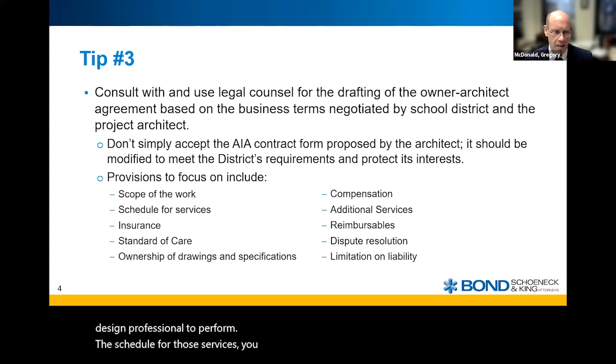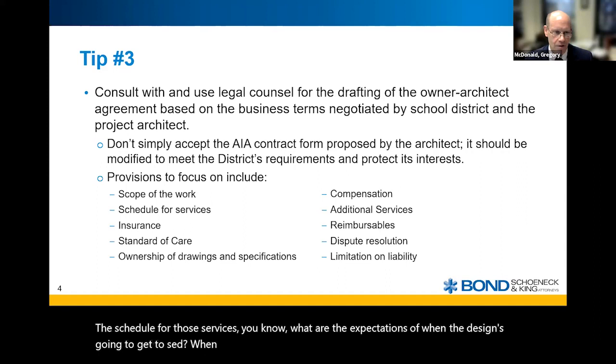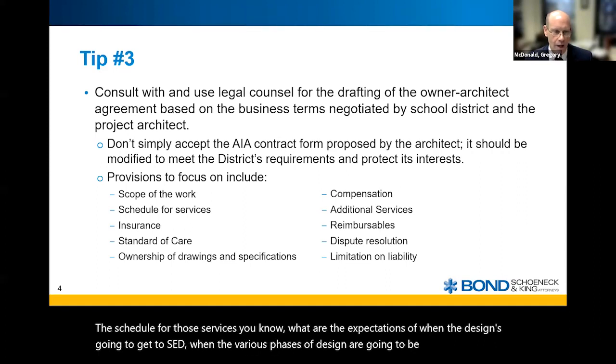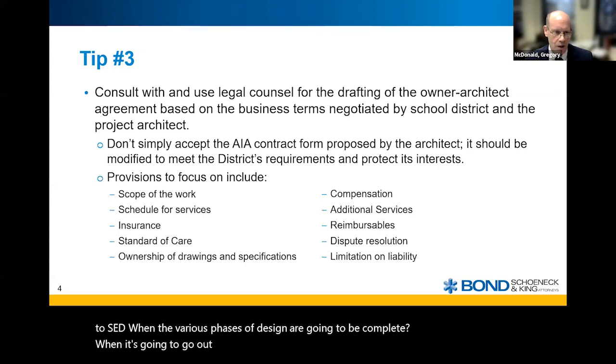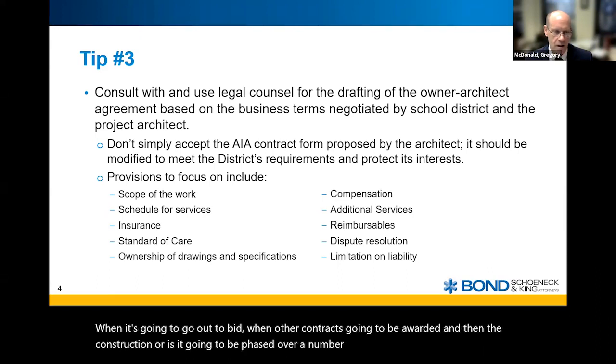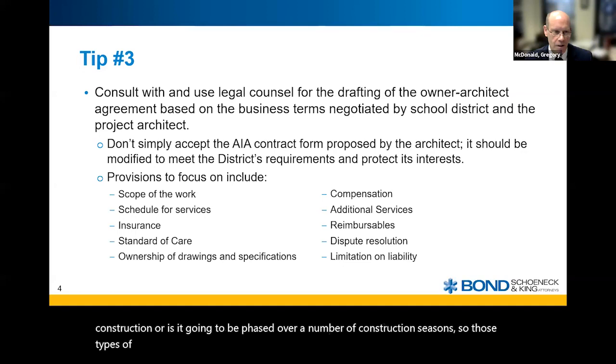What are the expectations of when the design is going to get to SED, when the various phases of design are going to be complete, when it's going to go out to bid, when the contracts are going to be awarded, and then the construction? Is it going to be phased over a number of construction seasons? Those types of things you would put in your agreement with your architect, and the length of the services